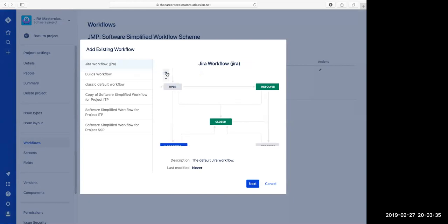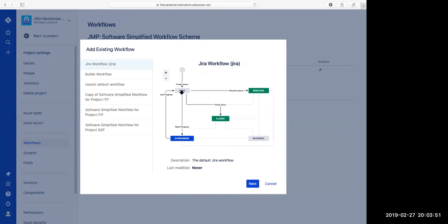So this is a bit tiny, but I don't know if you guys can see it. Can you guys see the JIRA workflow? Yes, we can. Okay, so this is another example, and this one is more complete because it contains transitions. So you have an issue going from open. So after it's created, it goes to open. Now the transition between open and resolved is resolve issue.